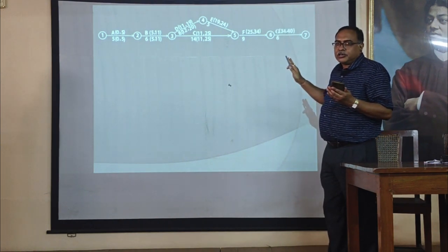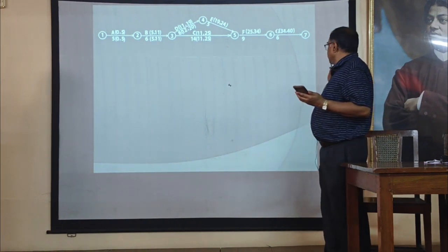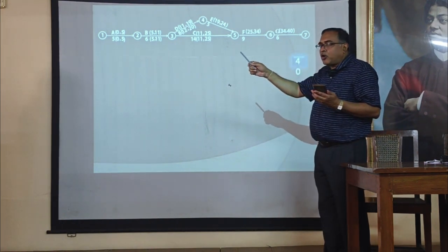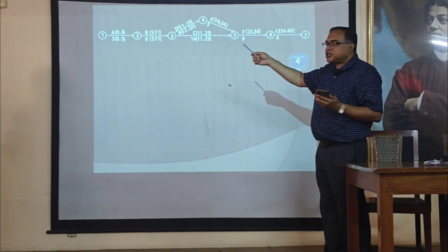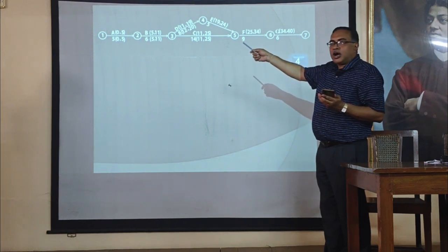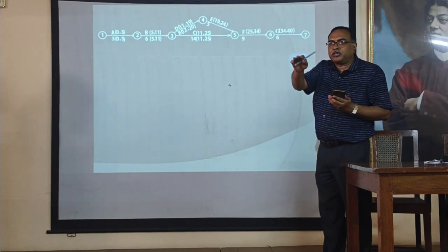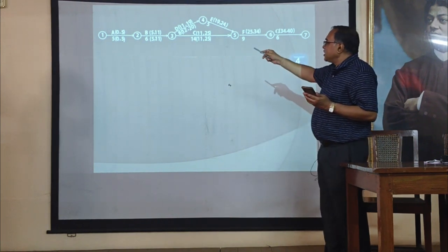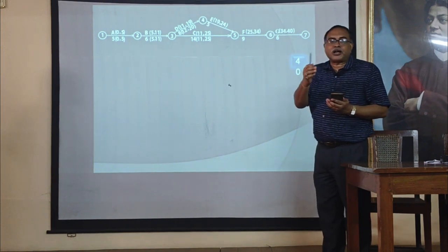Okay. Now, for our calculation, we have started; this is our forward technique. We can use our forward technique. First, A activity: early start time is 0 and early finish time is 5, from our given data and conditions. Next, B activity, naturally, early start time should be 5. Understand?